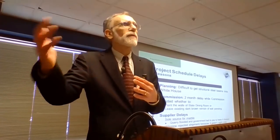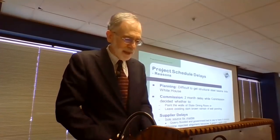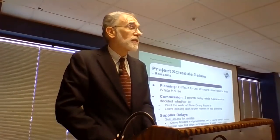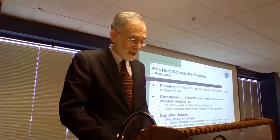There was the marble that the government was getting for the project. The quarry there flooded, and it had to be drained. So that caused an additional delay. The White House architect, Winslow, rejected some shipments because they weren't up to his quality standards.